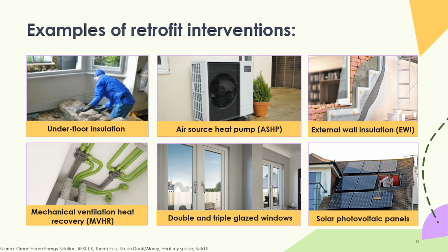I like that illustration as well because it gives you a good impression of the way that it has to be installed, all these different layers that work together to insulate and weatherproof the home. And that's why it can only be installed in certain conditions, because you have to leave time for things to set and cure and everything, and that can only happen in certain temperature ranges. The bottom two there, the glazing and the PV, I think it's quite obvious what they are.